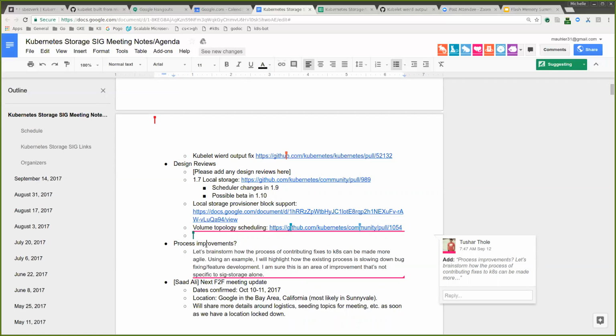I'm sure you are all aware, but I'll still break it down. So we post a PR for review. Review gets done, gets merged to master. Then we do a cherry pick request, and then cherry pick gets completed. That is the end goal here, right? So what we see right now is that every stage pretty much takes 5 to 8 days, and we have been contributing to Kubernetes for a year now.